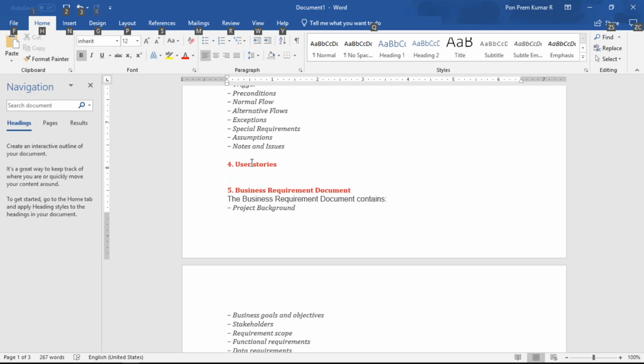Got you. And the spillages will be taken care of. For example, if we have 10 teams, 5 teams will be working on the user stories, and the rest 5 teams will be working on mini areas like bugs and spillages from the previous sprint. If there are 10 development teams, the ratio of developers and QA will be a bit different, 2:1. So the QA team will be rotated.